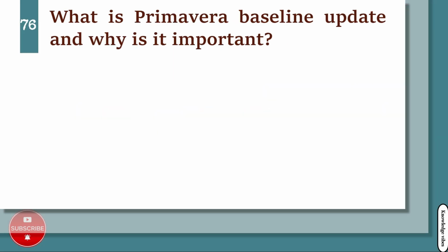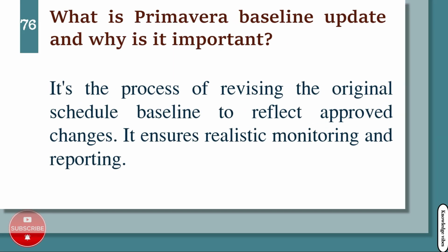What is Primavera baseline update and why is it important? It's the process of revising the original schedule baseline to reflect approved changes. It ensures realistic monitoring and reporting.